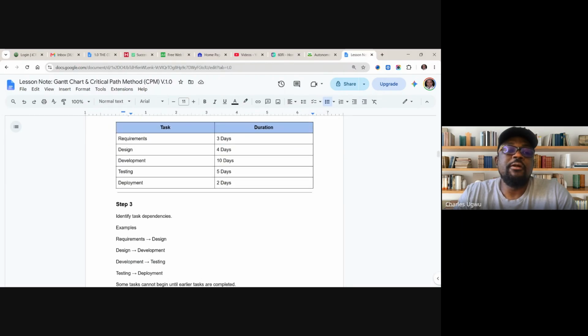You see here, we can add an activity like a RAID meeting. RAID meeting does not depend on requirement gathering. It might not depend on designing. It might not depend on development. It might not depend on testing or deployment. It can stand alone on itself.